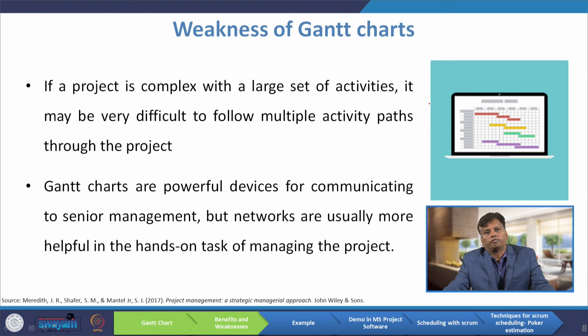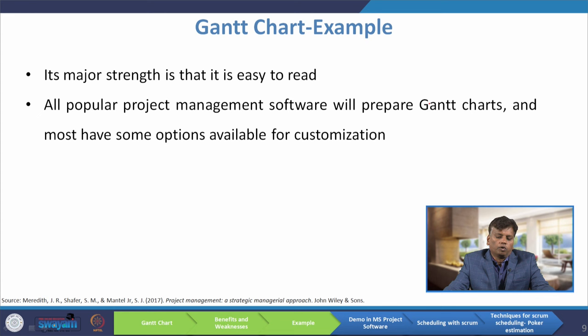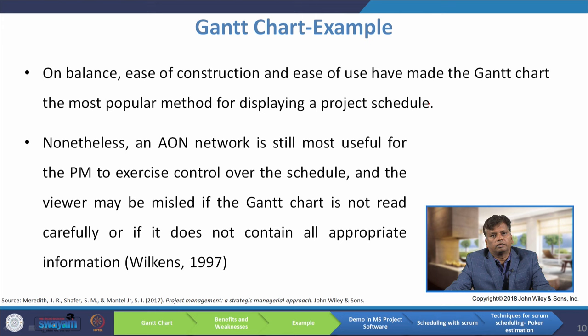The weaknesses of the Gantt chart: if your project is complex with a large set of activities, it may be very difficult to follow multiple activity paths through the project. Gantt charts are powerful devices for communicating to senior management, but networks are usually more helpful for the hands-on task of managing the project. All popular project management software will prepare Gantt charts with options for customization, such as MS Project. Ease of construction and ease of use have made it the most popular method for displaying a project schedule.